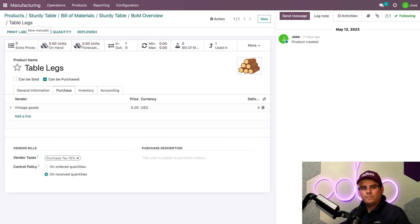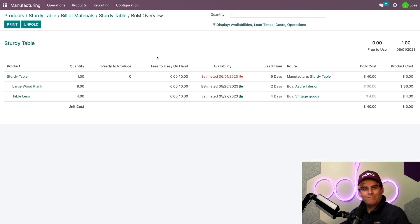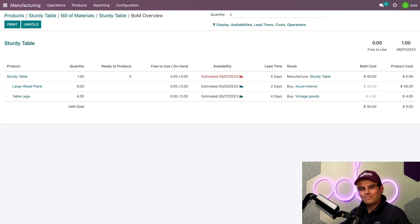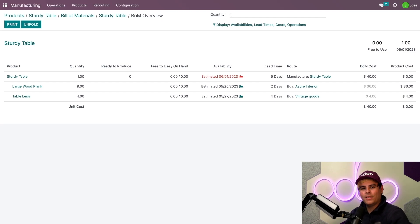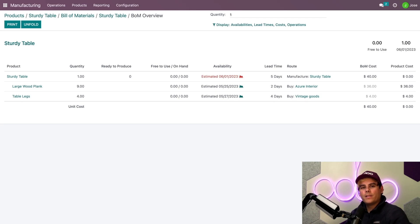So if we go back to the BOM overview using the breadcrumbs — which today are sourdough — look at that. It went from not available to giving us estimated dates. And that's because now that the lead time for the table legs is set up, the report has been updated with an availability for both of them.